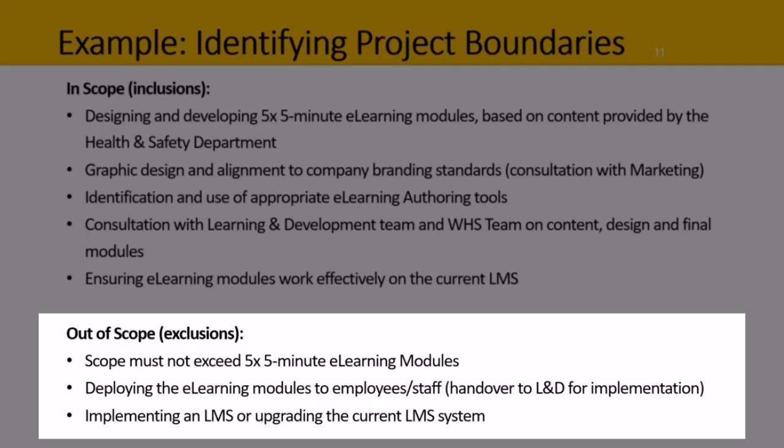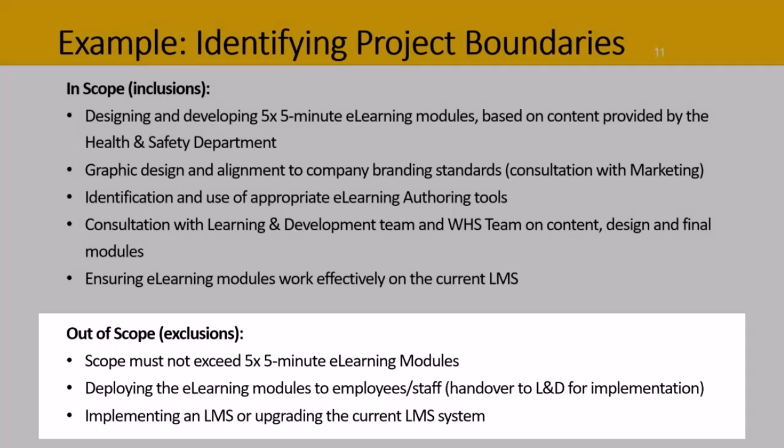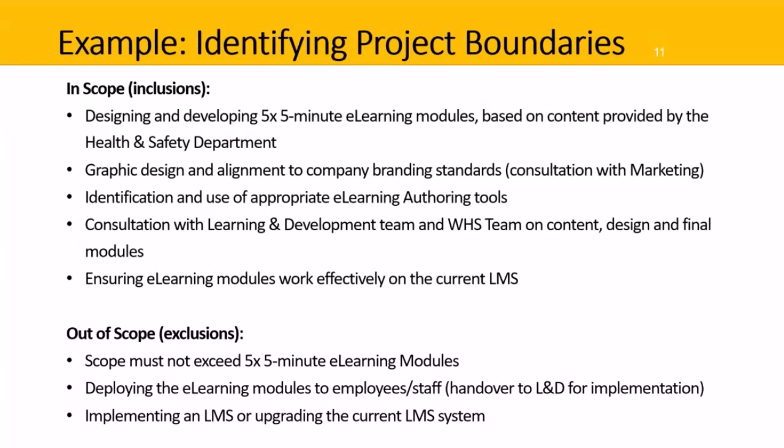So we're just going to hand over these modules once they're up and ready to go on the learning management system. We're not doing any implementation. Also implementing a learning management system, a new one, or upgrading the current learning management system, that's not included either. So now we should be much clearer about what's in and out of this project. Imagine starting to try to produce a charter without knowing this information. It would be very difficult.